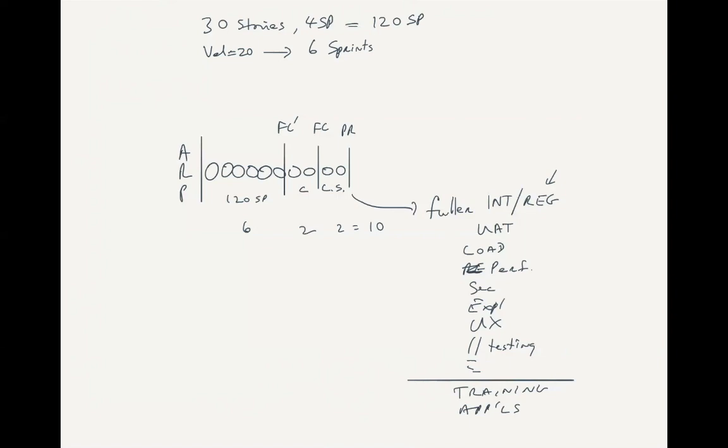We're going to assume very, very simplistically that the velocity over all the sprints is 20 story points. So if we divide the 20 into the 120, we get 6 sprints of identified work. So I then draw a line after those 6 sprints and say we're feature complete prime. That is to say, if everything went according to plan, everything would be built, tested, all the bugs fixed, the code would be clean because we would have refactored the code along the way. It would be quite wonderful, except that we know things will never go according to plan.